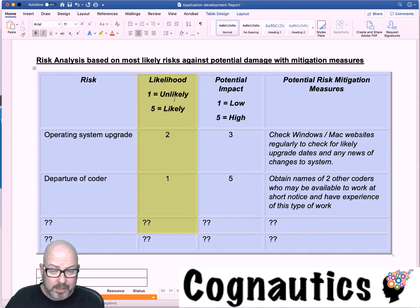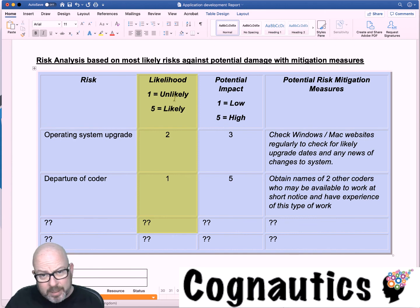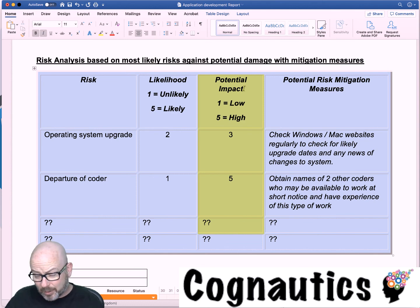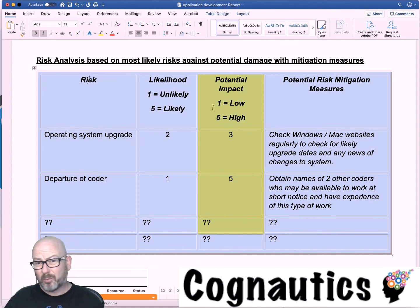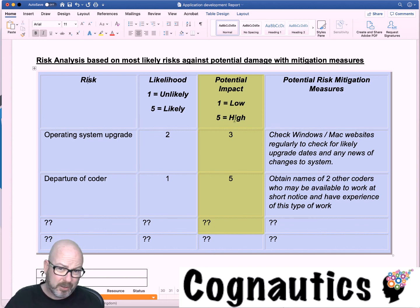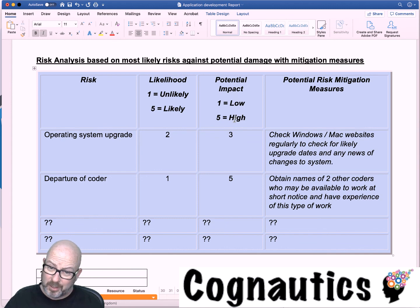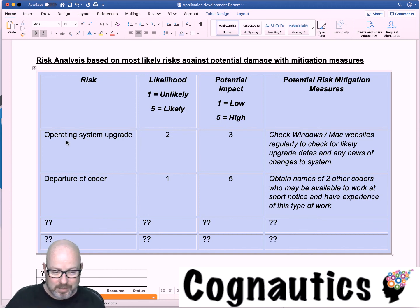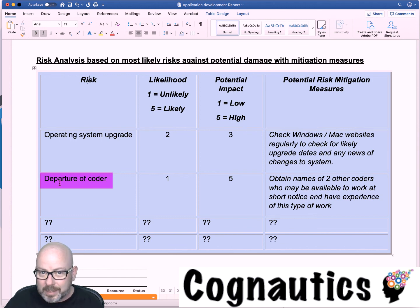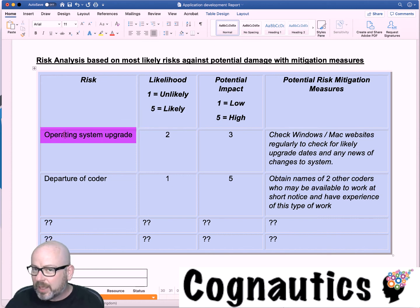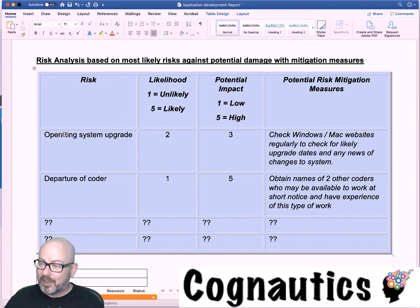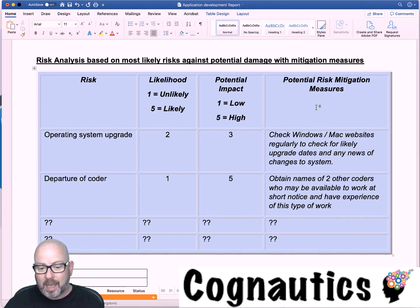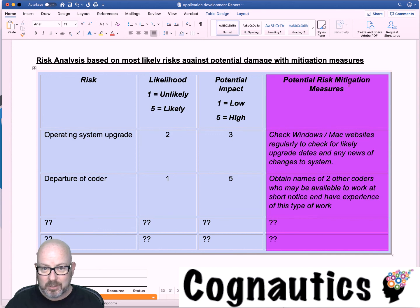That's what you're looking at here: likelihood. Potential impact: if it rains, potential impact is a one because we're quite used to rain. If we have a volcanic eruption or an earthquake that's going to have quite a high risk. You're not planning for tsunamis, earthquakes or acts of God here, but you are looking at things that could derail your project. For example, the coder leaving, the coder not being able to code, an operating system upgrade. Think through four or five different things that can go wrong and then grade them on their likelihood, on their potential impacts.